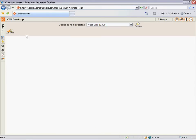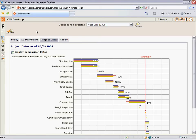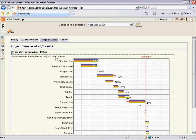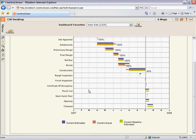The first is using the Project Dates tab. This gives people a place they can go and check the progress of the project on specific milestones. These are high-level milestones, not a full complete construction schedule, but a user can consult this and understand what the estimated and actual dates are for each milestone. This same information could be sent out across your project team on a regular interval via the reports.